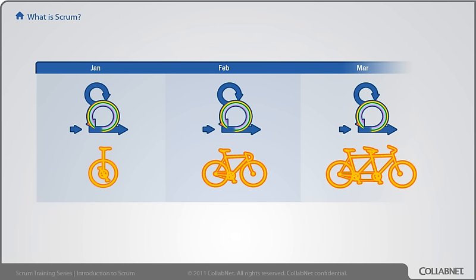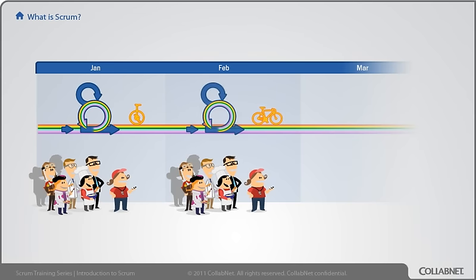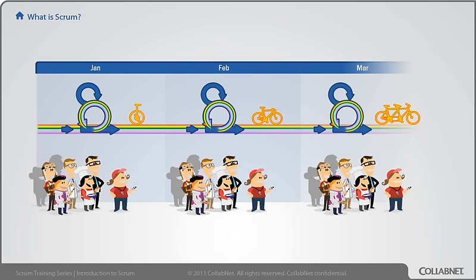Sprints are officially 30 days long, and most Scrum teams are doing them in less — such as two weeks. To make a shippable product every two weeks, we need people with skills in testing, design, business requirements, and coding, all on one cross-functional self-organizing team. Instead of waiting for the end to start testing, we'll start testing from the very first sprint. Instead of doing all the design upfront, we'll do a bit of design every sprint until it becomes continuous design, with small amounts of continuous redesign and refactoring to avoid technical debt. Every sprint combines all aspects of the work, and a Scrum team should collaborate together instead of working in phases with handoffs.